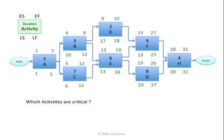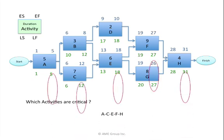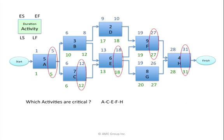Another question asks which activities are critical — meaning which activities are on the critical path. We know an activity is on the critical path if its late numbers are the same as its early numbers. Here we can see activity A, C, E, F, and H are all on the critical path because their late finish numbers are the same as their early finish numbers.